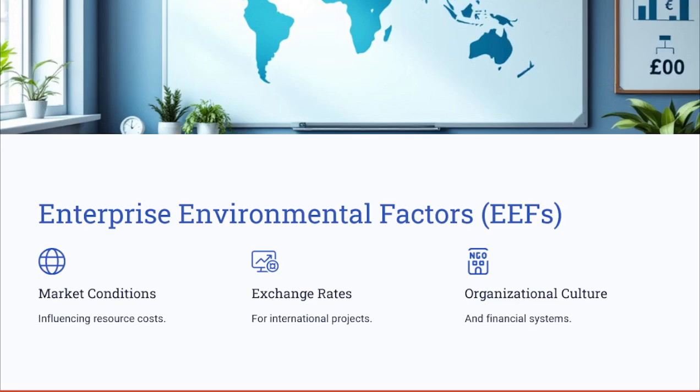What's the role of enterprise environmental factors, or EFs? EFs include external and internal conditions that impact the cost planning. For instance, fluctuating market rates can influence the material costs, while organizational financial systems determine how the budget is tracked and reported.